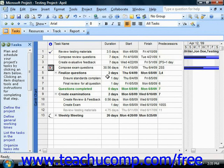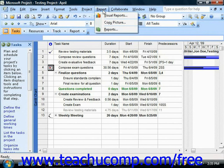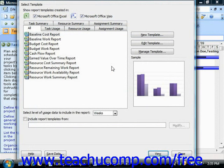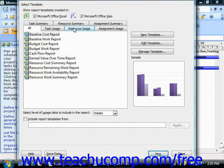To create this report in Microsoft Office Project 2007, simply select Report from the menu bar and then choose the Visual Reports command. This causes the Visual Reports dialog box to appear. Note that you must have the Microsoft Office Excel checkbox checked in order to show templates from Excel within this dialog box on the tabs below.